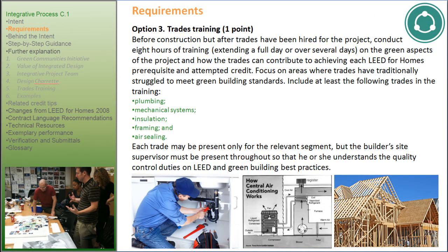Each trade may be present only for the relevant segment, but the builder's site supervisor must be present throughout so that he or she understands the quality control duties on LEED and green building best practices.